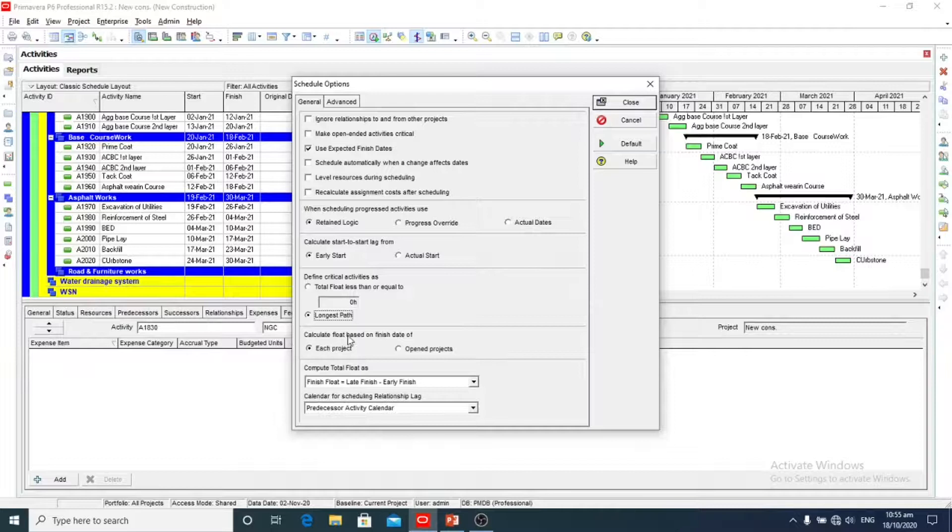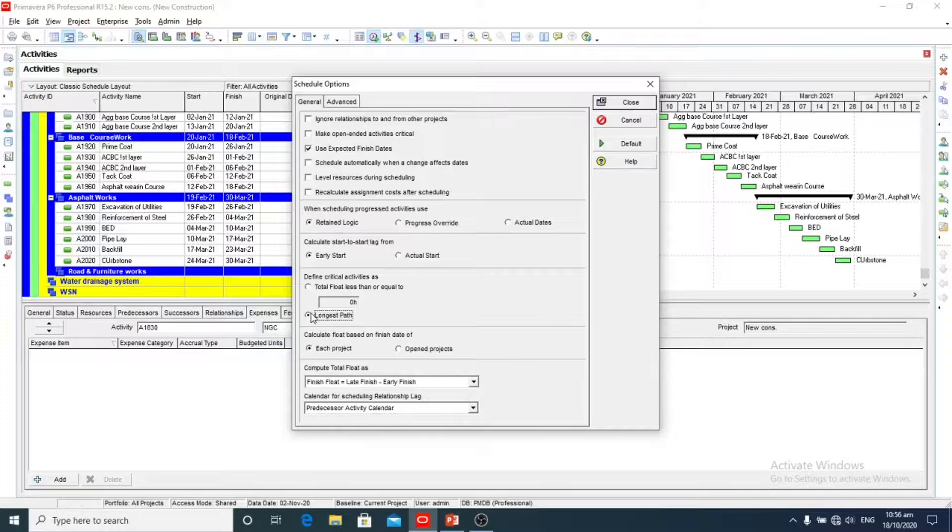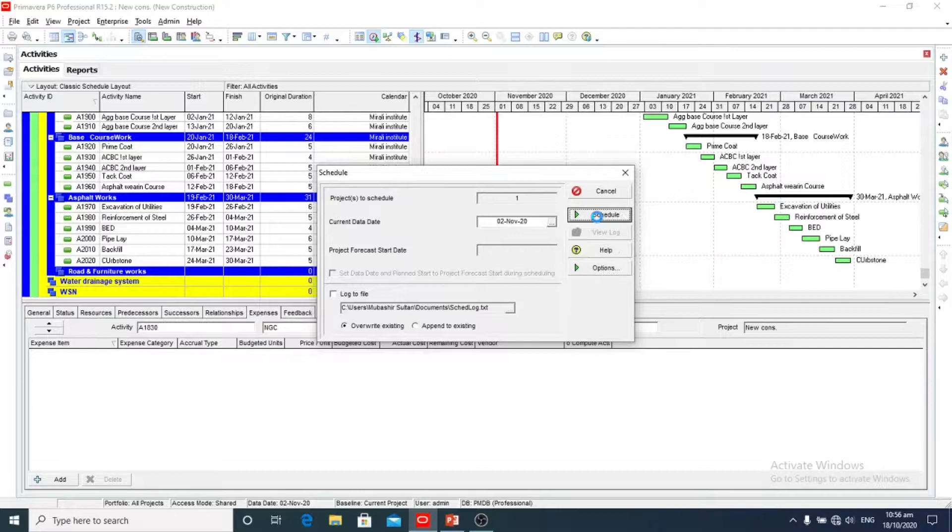Calculate start to start lag from early start and actual start. Calculate float based on the finish date of each project. Compute total float. So we will select longest path. Close. And we will schedule.